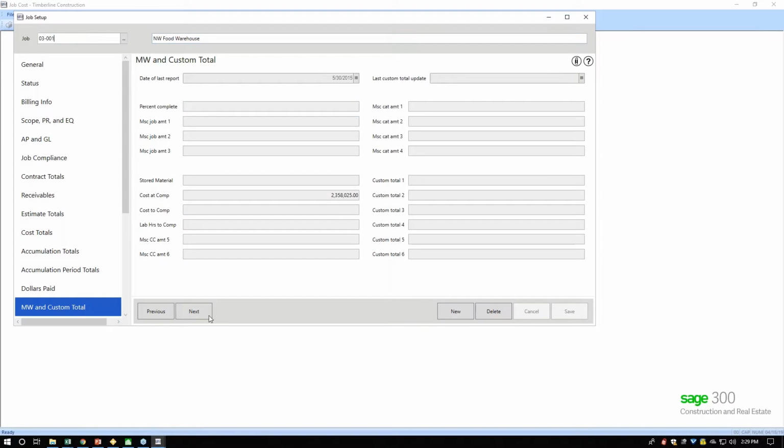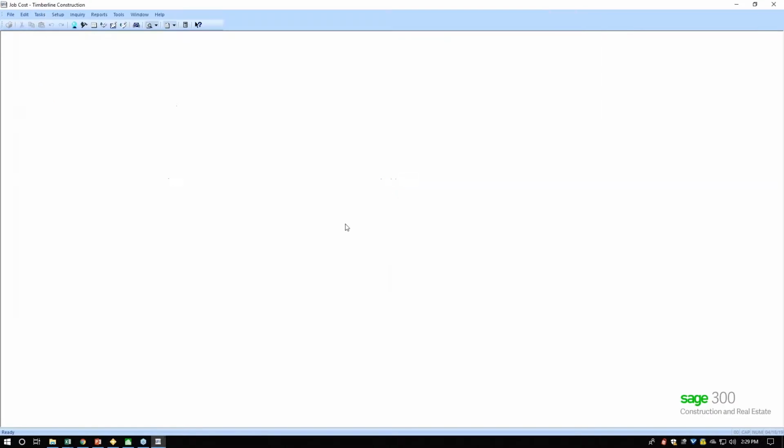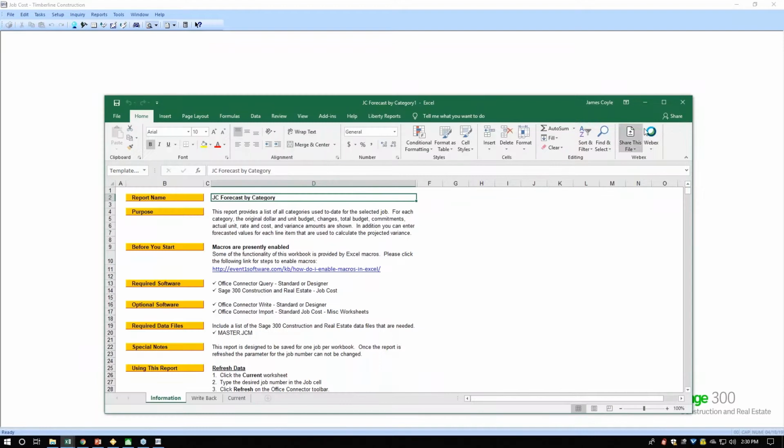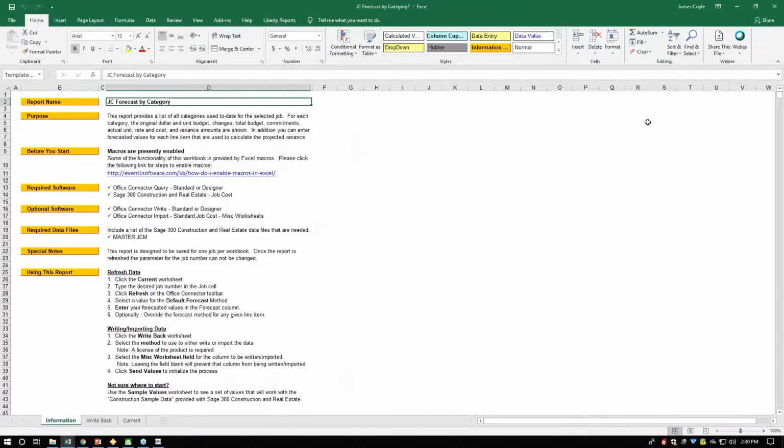I talked first to you about project cost forecasting, and that's how this conversation begins. That's actually how I began to learn how people might want to use this technology back in the 90s, and until someone asked a question, I never even thought about it. So there are all sorts of project cost forecast type workbooks. I've seen people do it all sorts of ways. Hours to go, units to go, % complete, cost complete, cost of completion, who knows? And sometimes it's a mixture of a bunch of things.